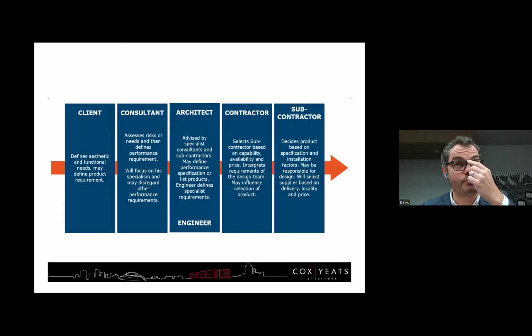That will then go out to a number of construction companies who will price on it. The construction company or the contractor will then build it. The contractor will be supervised by the engineer, the QS, and the architect. The contractor or construction company will then subcontract to subcontractors. So if you just look at professional indemnity aspects that can arise in that deal flow, there are a number of areas where a professional, not just the engineer, but the quantity surveyor and architect, can get it wrong.